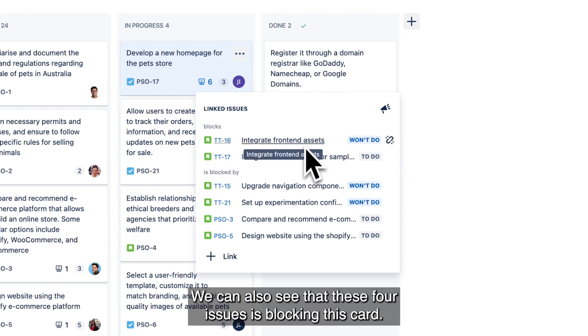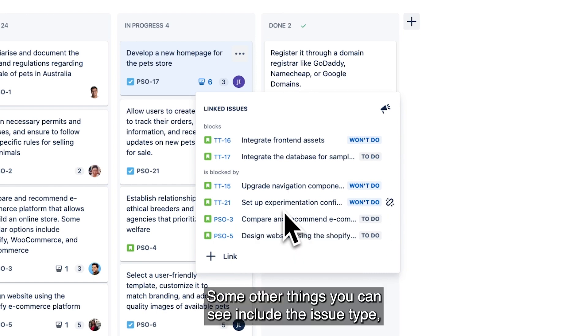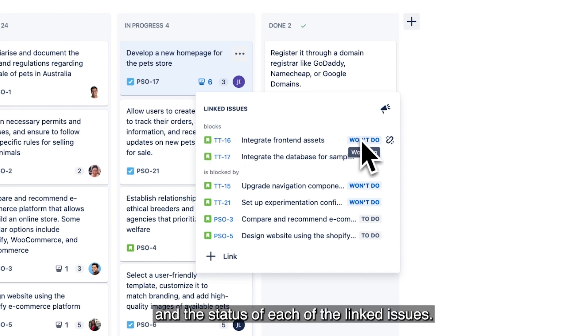We can also see that these four issues is blocking this card. Some other things you can see include the issue type, the issue key, summary, and the status of each of the linked issues.